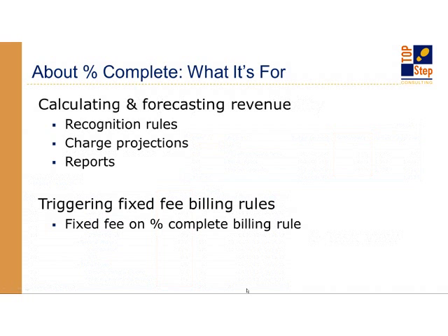The other thing we use percent complete for is we can trigger fixed fee billing rules. Once the project reaches a certain percent complete, then a billing will trigger. We'll look at that also.